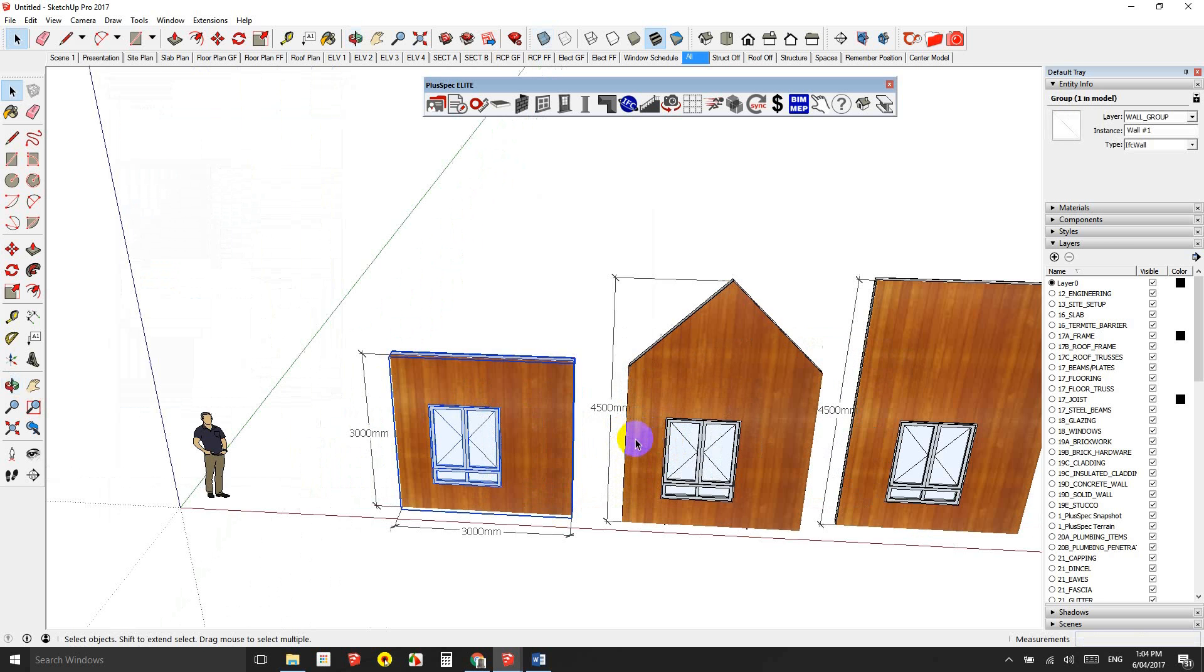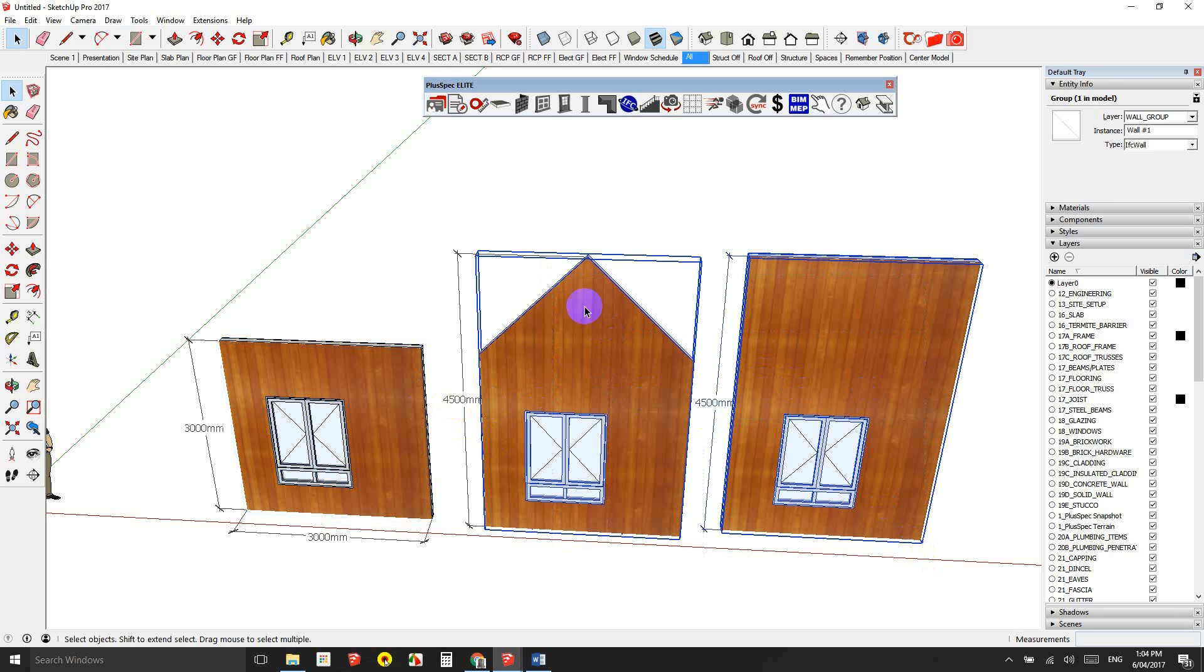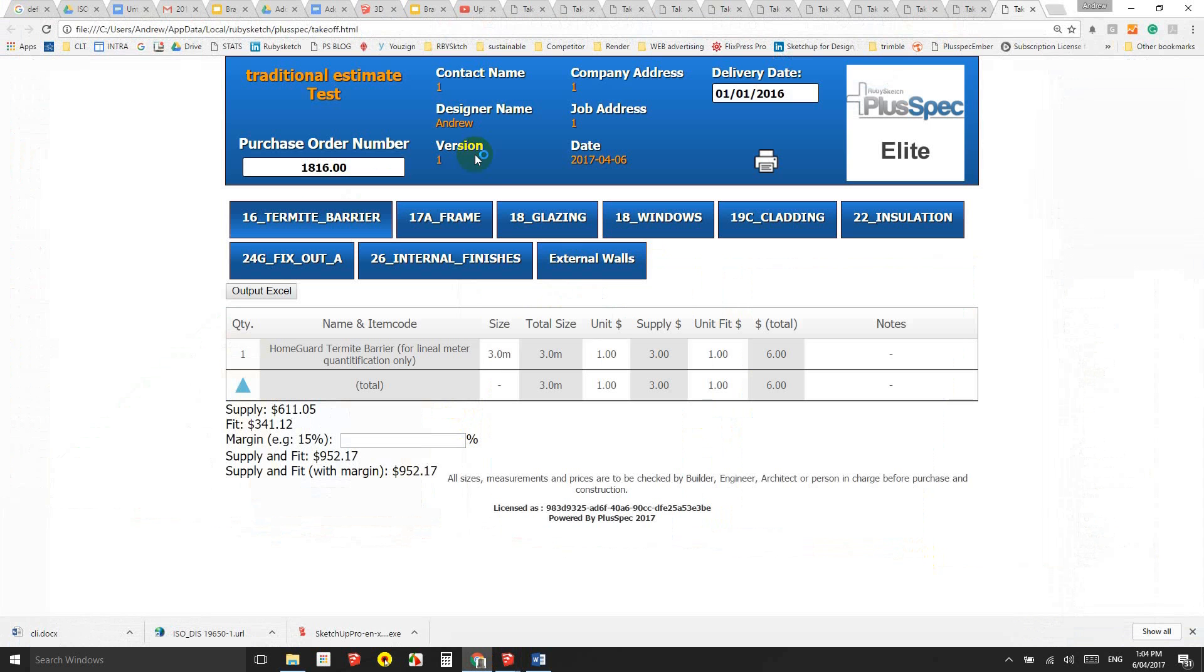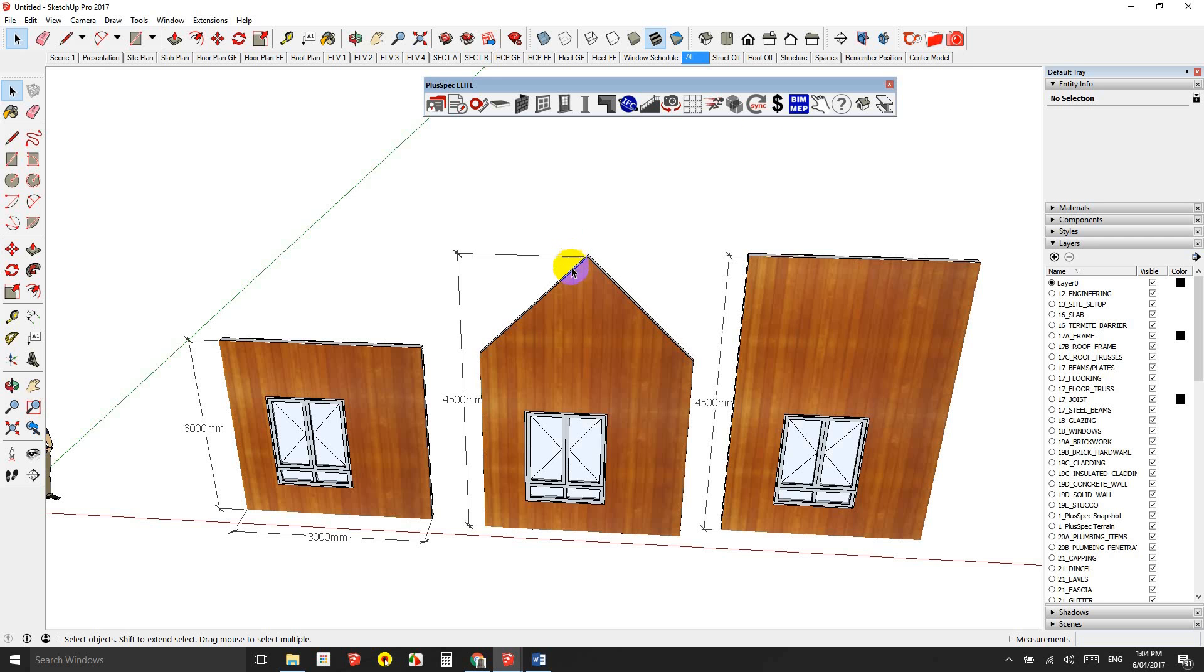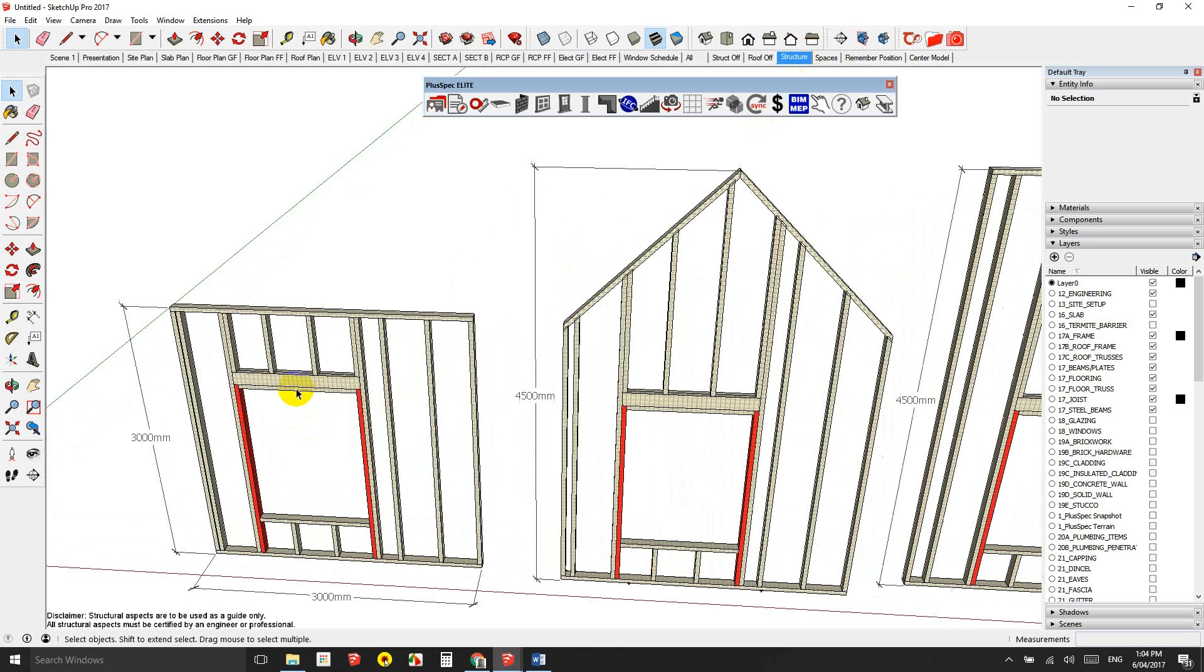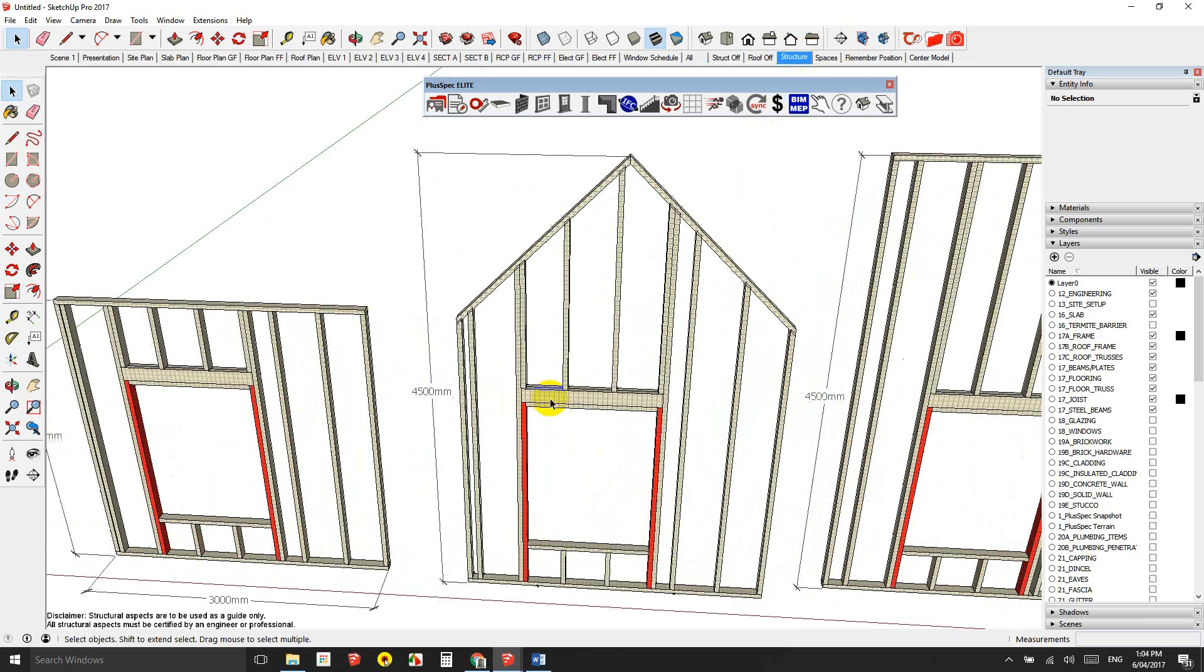So we still have, we now have the exact same size windows in all of these walls. Now, the best thing is we don't have to go and calculate all of our windows and deduct them from our walls. We're getting exact according to each wall. So I'm going to hide these two again here now. Hide. Do my takeoff. And now I have $952, because it deducted the amount of cladding and the amount of timber work that was required behind them. I'll just quickly show you that. I'll just control Z and just show you what actually happened.